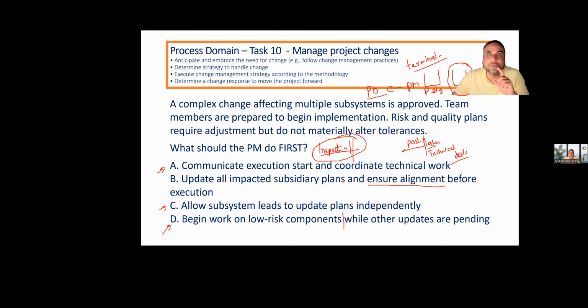The product owner will not let them continue and they will terminate. Then the prioritization will happen. The product owner will go to the stakeholders to discuss, and then reprioritize. That is the reason, because it's a critical risk which can destroy things.